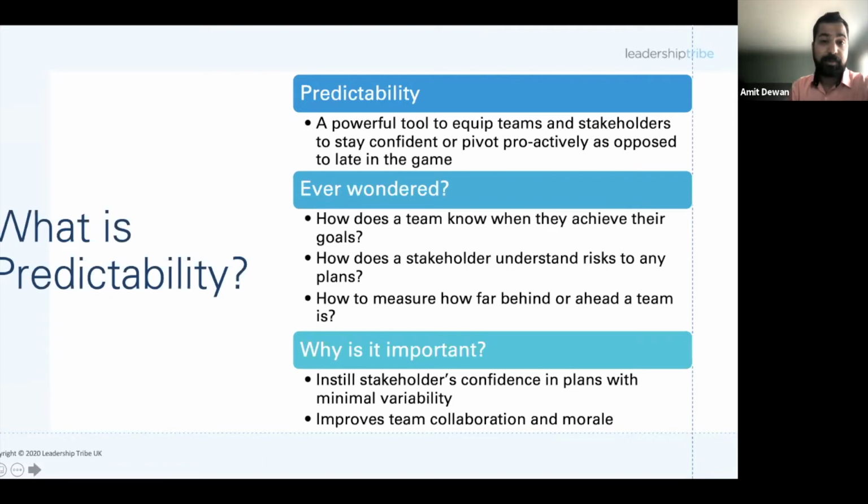But typically what you'd be looking at is, at a team level, you want to see more sprint level goals, right? And a level up from there, how are we contributing towards the quarterly plans or features that we're building towards. But most importantly, I think for day-to-day work, the kind of dashboards that I've seen work best are maybe a Kanban board, which would help the team be able to see what's really going on and how long anything's stuck in one queue.